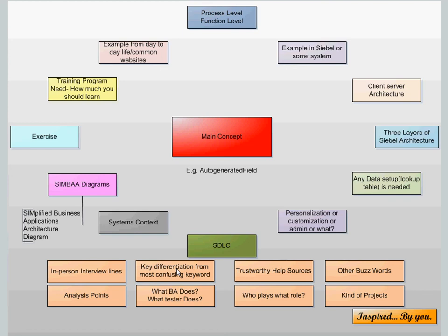So basically what we will do, what we will achieve, what is the boundary, what all we will achieve and what all we will not achieve as part of this project. For example, we'll deliver a sales management system but will not work on incentives. We might say we will not work on the client master data management system. We will not do anything related to that. If there is a problem in the client master data management system, then the problem arising out of that will be out of scope for us. This is how we talk about the scope. Okay.